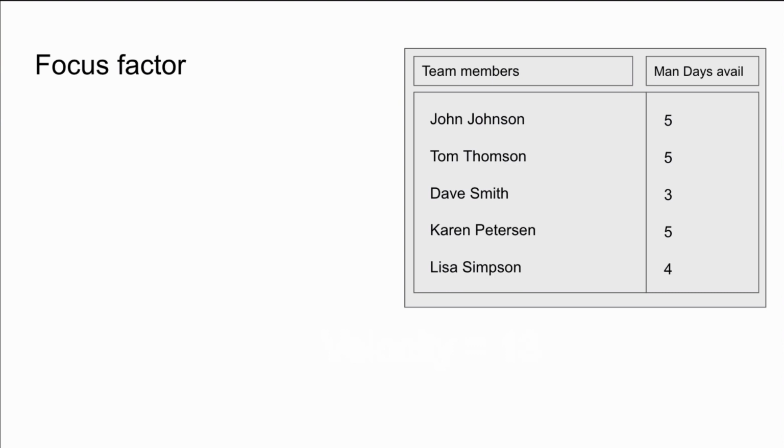Now for the focus factor, this is a constant which indicates the performance of the team. So how well are they working together, and this can actually be calculated based on the amount of time that they spend working together on the stories and the number of story points that they complete.